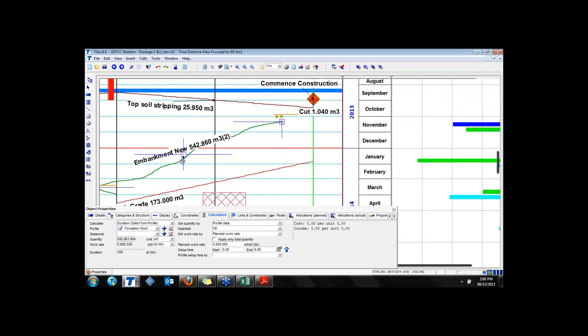For example, when you change the position of your embedding team, now this task is taking 180 days. When you do this activity in another position, it is taking 110 days. So based on this, you can make your analysis at an early stage or at the executing stage, because your plan is changing constantly.